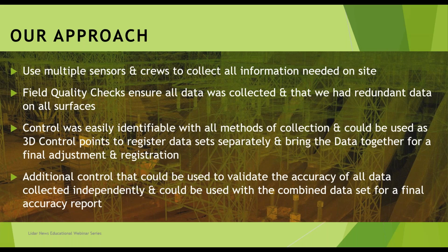Due to weather concerns and other things that actually came up during this three-day window, we were only able to collect LIDAR data over a two-day period, which was enough to collect all the data we needed. And with the field quality checks, we ensured all data was collected and that we had redundant data on all surfaces to be able to validate everything.